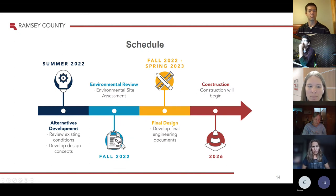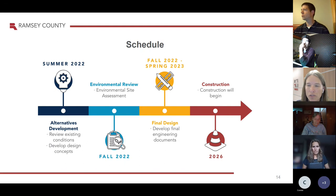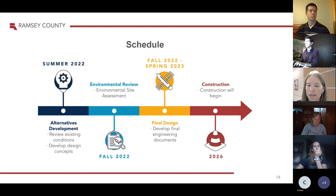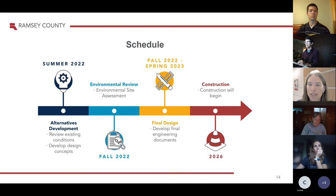For the schedule, we're working through some of the design alternatives right now and have laid out some of the engineering constraints, which Cassie will go through shortly. This fall we'll be doing an environmental site assessment and moving into preliminary design. As we move into 2023, we'll be finishing our design, and then construction right now is planned for 2026. Depending on how the scope plays out, some of those elements could be moved to an earlier date, but right now everything is planned for 2026.